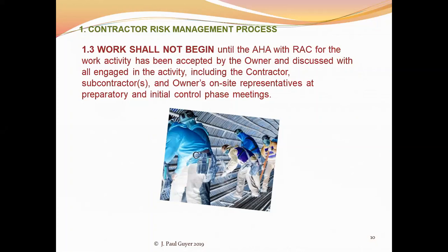And the owner takes the activity hazard analysis that you have prepared, submits it to the insurance carrier, and the insurance company says, okay, you've thought this through, go ahead with the project and we'll cover you, or no, you haven't thought the risks through on this project, so go back to the drawing board, if you will, as far as worker safety is concerned. So from the perspective of your company or agency, a very key actor in this process is the insurance company.